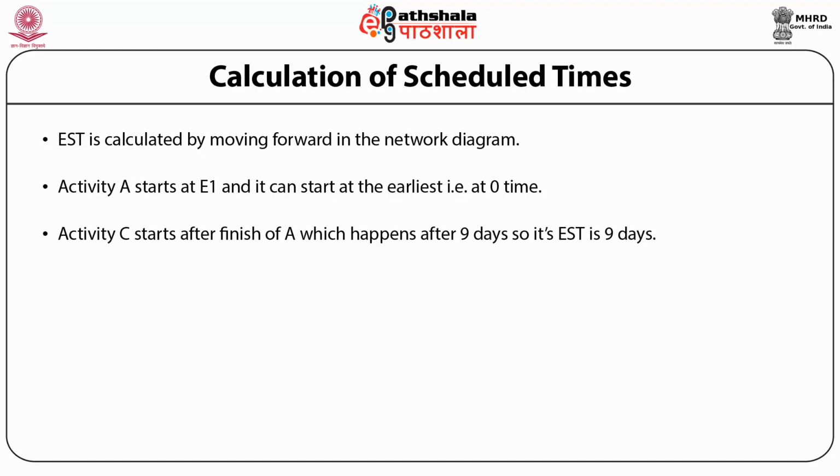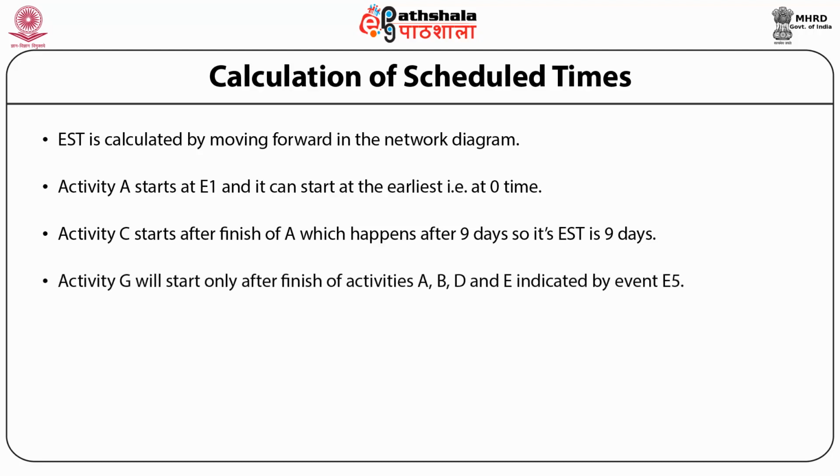Now what should be the EST of G? Activity G will start only after finish of activities A, B, D and E, indicated by event E5.